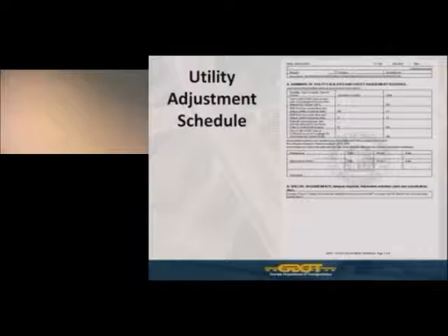Now this goes back to what I've discussed earlier, that all the facilities must be this or that before work can be performed. Obviously the poles must be in place, the new poles, before an overhead guy can be in place. And for this scale of project, and I'm not familiar with it, again, this may not be an issue. But if there were more poles involved, then the question probably would be raised as to, can you not guy some of the poles coming behind Georgia Power as they complete their pole installation, and you do part of the work while they're performing and just follow along behind them.